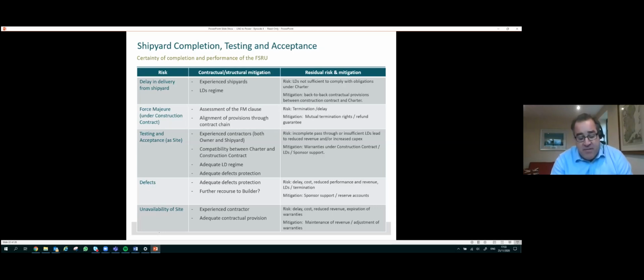In terms of such technical acceptance, there will be a detailed testing regime, both in relation to the sea and gas trials, that will need to be carried out on the unit prior to its technical acceptance by either the project or the FSRU sponsor. And in the event that there are defects determined during such tests and trials, these defects will need to be rectified by the builder prior to delivery.